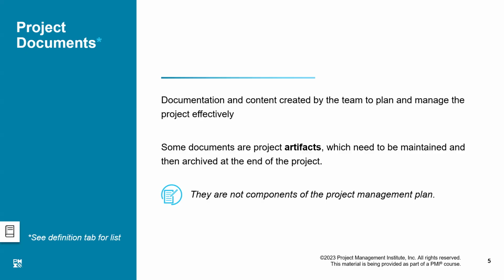But all these interim documents are necessary to be created, but they are not necessary to execute the project. For execution of the project, I just need the schedule baseline, scope baseline, and the cost baseline. You understand this point? For execution purposes, baselines are sufficient to have. But while we are creating those baselines, we actually develop a lot of things. All of those things are called project documents,